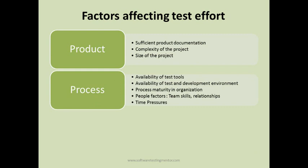Process factors also affect test effort. The availability of test tools is one factor — if tools are available from the start, it takes less effort; if everything must be done manually, effort increases. Availability of a ready test and development environment also reduces effort. Additionally, if process maturity in the organization is high, less test effort is required because mature processes are already in place.